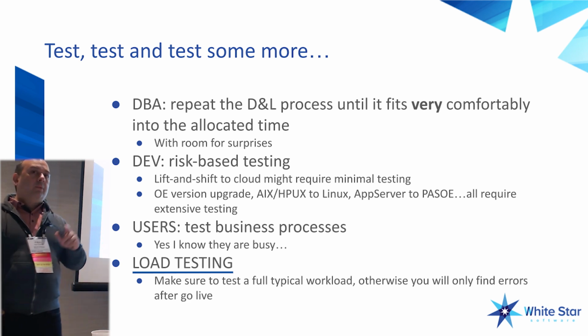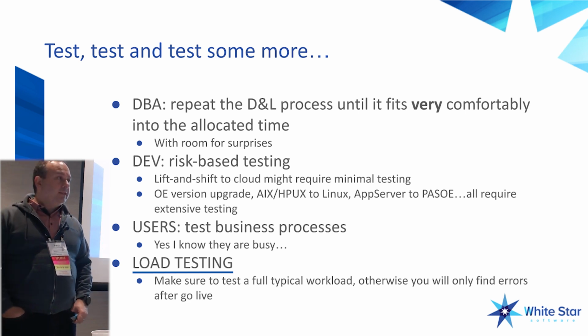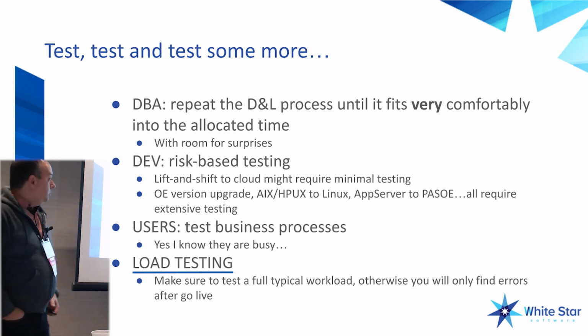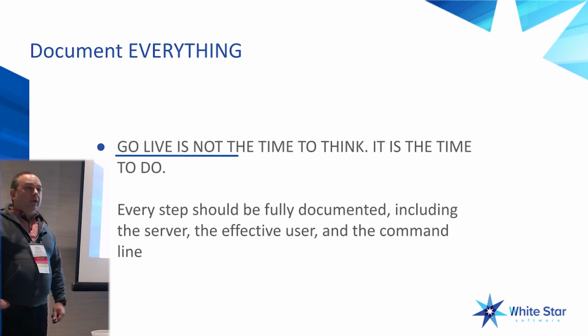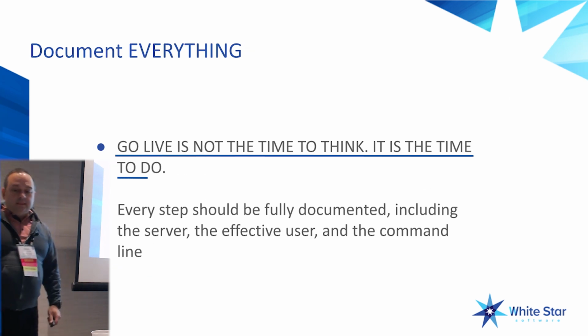A month later, they brought 400 employees in again on a Sunday. We passed with flying colors, but it also means that the Monday we went live, 1,600 users were working on the system with almost no problems. So don't forget to load test your new system. And the last thing, again: go live is not the time to think. Go live is the time to execute your procedure.